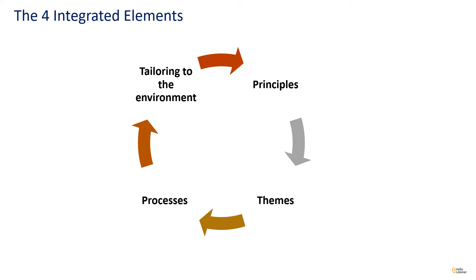The second element is Themes — seven specific areas of project management that are continuously and simultaneously monitored and updated throughout every project. The third element is Processes — seven steps carried out in chronological order starting with the beginning of the project and ending with its closure phase. The last integrated element is Tailoring — how we adapt to the environment, because PRINCE2 must be tailored to fit your project's type and size.